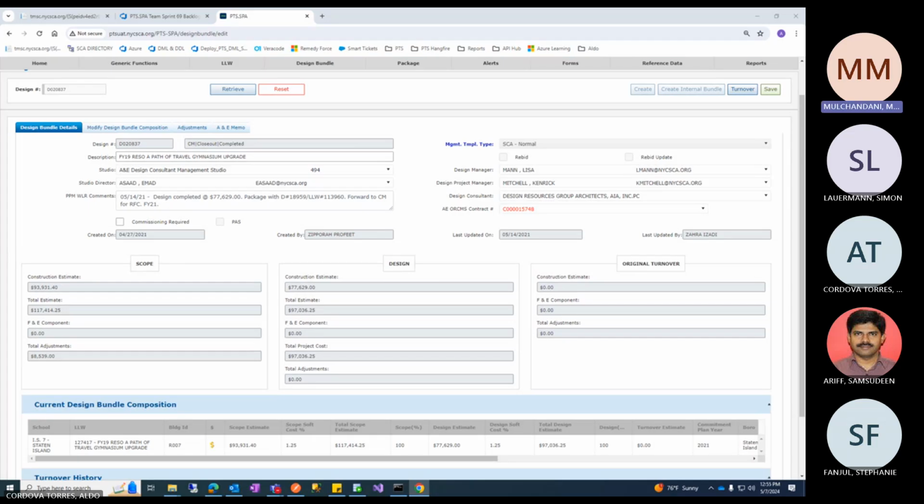The reason behind it is that the next activity belongs to the same department. When the next activity belongs to the same department, it just automatically goes to the inbox of the next activity. When the next activity belongs to another department, that's when forwarding comes into play.